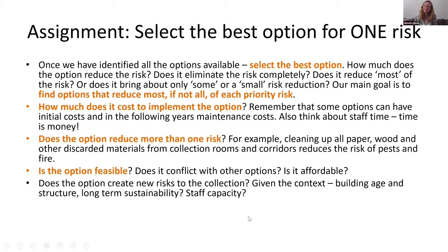So you need to put something in place. It would probably be a low priority risk, but you would have to put ant traps out, or have a fumigation done, or see where they're coming in and block that hole. That should be in your assessment if you think it's a risk, but it might come out as a low risk. What proportion of the collection would be affected, and how badly damaged would the individual specimens be?